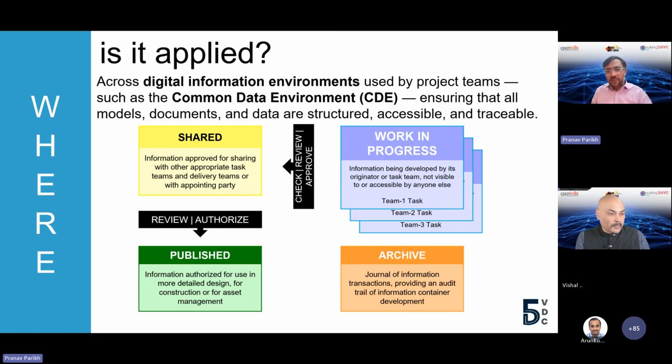Once you are ready with that file to be shared with the larger stakeholders for further coordination and collaboration, then you take it through a review, check and approval process, and submit it to a shared pool of folders where all the documents are shared with the larger stakeholders, right? And that is where you start talking to other consultants, maybe the client team, maybe the subcontracting team, maybe the cost consultants, maybe the schedule consultants, and that is the shared space where we now start coordinating and collaborating on those documents. Let it be drawings, BOQ, schedules, or 3D models, right?